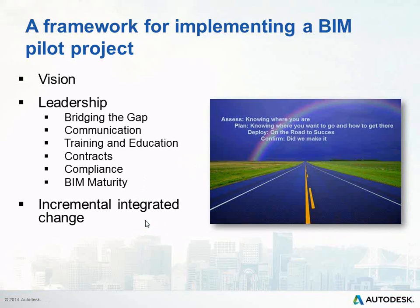With the groundwork done, you've assessed your current workflow and planned what you'll need to do to become proficient in the new workflow. Now you're ready to implement the strategies and apply them to a project. It's time to pick a pilot project. The project you select should be a simple, repeatable project — something you've done before. You want to have a single dimension of learning; you don't want to use new software on a type of project you've never done before. A pilot should include measurements at key stages to understand how BIM has improved the design and construction process.